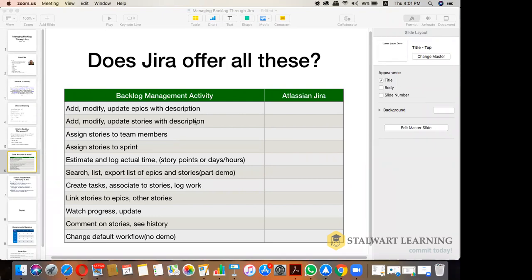These are mentioned as bugs, so they do not follow the hierarchy of the backlog management. But it's a good question to ask why, even if they are bugs, they have to go back to the backlog only. They need to be considered as part of a future sprint, either current or future, mostly the future sprint. And they do not get estimated. So you always have to figure out a bucket of time. If you take 30 story points, you can say 5 story points are reserved for bugs. A very crude way of saying it, but that's how it works. That's a pragmatic way. And in terms of days, if you have 10 days, you can say 1 or 2 days are reserved for bugs, depending on how many bugs you have.